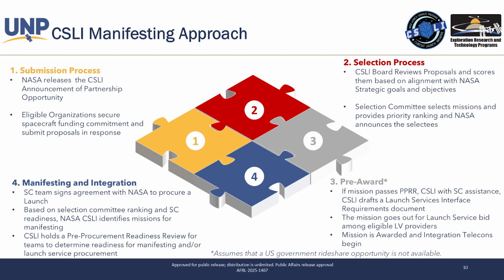But if you don't show up for that launch service, you owe NASA all the money that we've spent to procure you a launch service. Because if you don't show up and we've spent money to get you a launch service, then that's money that we can't spend to put other missions on a launch service. We want to make sure that that doesn't happen. Based on that committee readiness, after we get all those CRADAs signed, we then identify missions that are ready for manifesting.